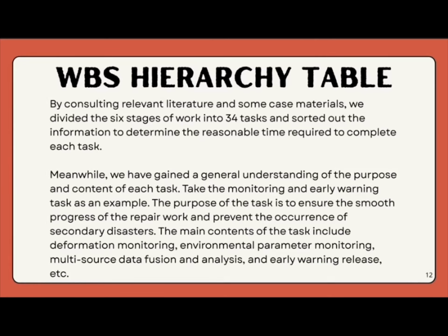Take the monitoring and early warning task as an example. The purpose of the task is to ensure the smooth progress of the rapid work and prevent the occurrence of secondary disasters. The main contents of the task include deformation monitoring, environmental parameter monitoring, multi-source data fusion and analysis, and early warning release.